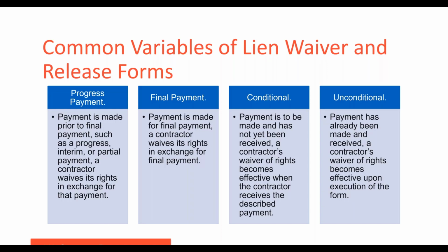So Sarah, if I were to sum up here, if I'm an owner, I'm going to state the obvious: if I've already made payment, I want the unconditional version of this. Is that right? And also, if I'm the contractor and I haven't been paid, I better be very careful about signing an unconditional one, because I'm going to be relinquishing rights before I get paid. Have I made the obvious point here? Yes, so much caution should be taken by contractors when signing unconditional lien waiver forms. But if I were to put on my owner's hat, I would want more unconditional lien waiver forms than conditional, provided that everybody's been paid as they should have been. Absolutely.